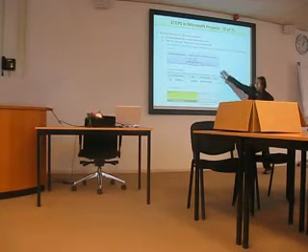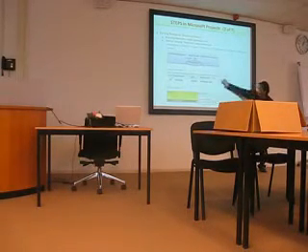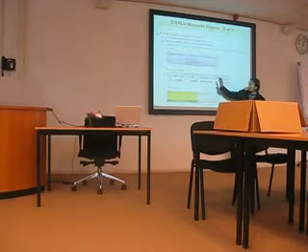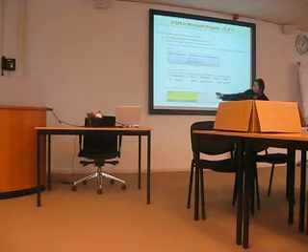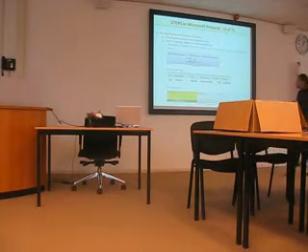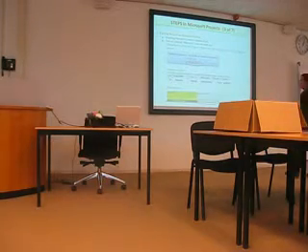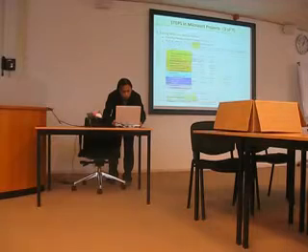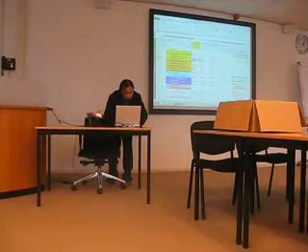When we assign the resources to the task and then add 50, Microsoft Project will automatically calculate it to 13,750. It is very good, a very beautiful feature of Microsoft Project.